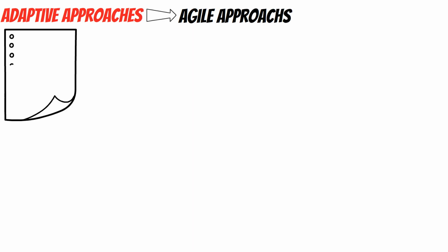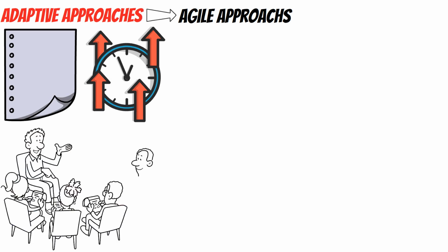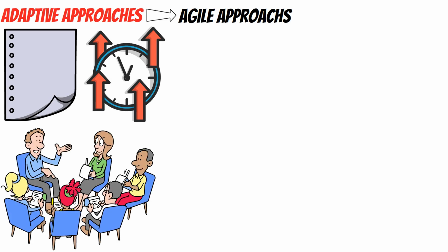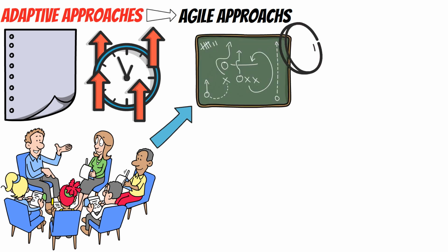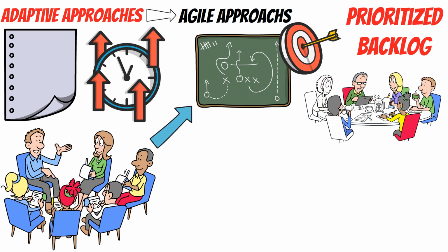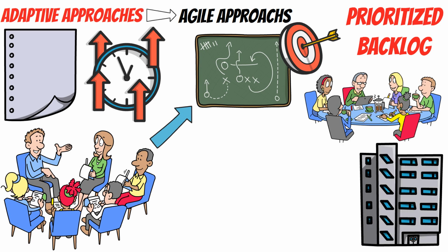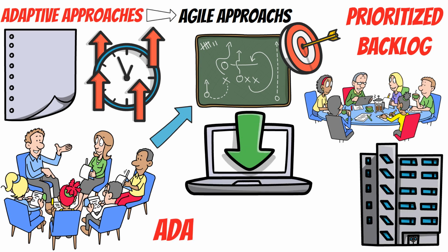Adaptive approaches are linked to the agile approach. Some agile approaches entail iterations that are weeks in duration, with the team demonstrating accomplishments at the end of each iteration. The project team is very engaged with the planning for each of the iterations by determining the scope they can achieve based on the prioritized backlog, estimating the work involved, and working collaboratively throughout the iteration to develop the scope.